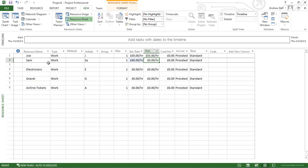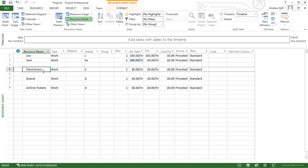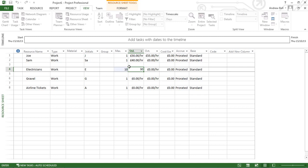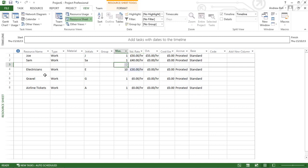One of the decisions you'll have to make is: are you going to enter your resources individually by name, or are you going to put their generic resource type? For electricians, I'm going to have 10 of them in my department, paid £30 an hour. The plus for putting in electricians as a group of 10 is that it doesn't matter who is working on the tasks, as long as they've all got the same skills. If you put in the 10 electricians by name, it is absolutely clear who is responsible for each task, but if one of them was to leave, you would have to find everything they were allocated and replace them with somebody else.